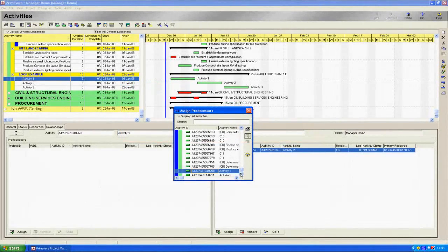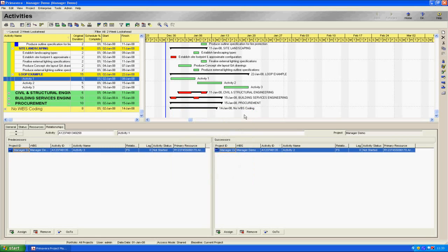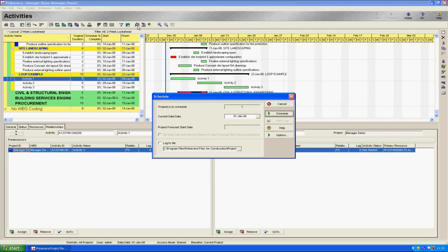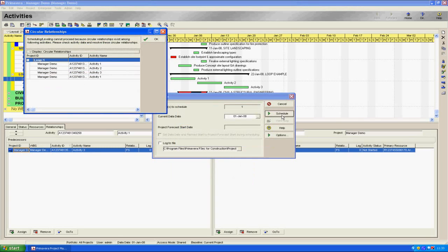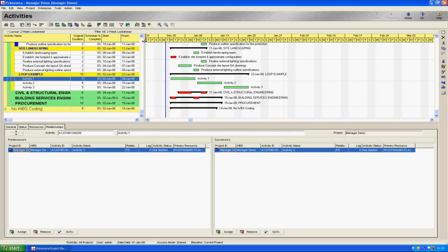When I do this in a conventional planning tool, as I'm doing now in Primavera, and then press Reschedule, the planning tool throws me an error saying I've created a circuit and suggests that I've made a mistake. This is an incorrect assumption, as design by its very nature is an iterative process. Conventionally, in order to resolve this circuit error, a planner would either miss out the dependency entirely to avoid the problem, or they'd falsify the sequence to promote linear steps that work around the fact that an iterative loop exists.